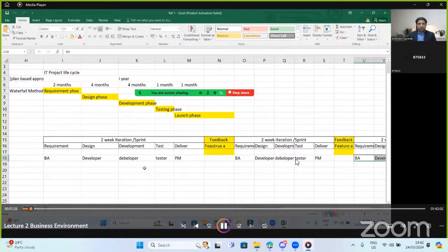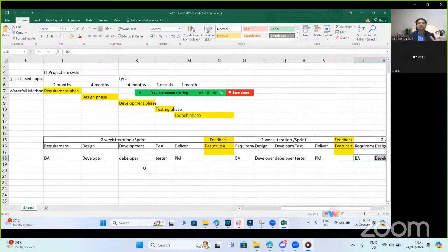If it is a complex project or a multi-phase project, it can be a project where the requirements are not clear on day one. Then we divide the project into smaller iterations, and we say, okay, let's develop the things that are clear, and let's plan for those things which we can deliver. We can plan our resources around those things, and then we deliver those things, and then we leave the product owner or the customer to continue to wish and continue to dream and bring about more features till we deliver what is very clear to us today.